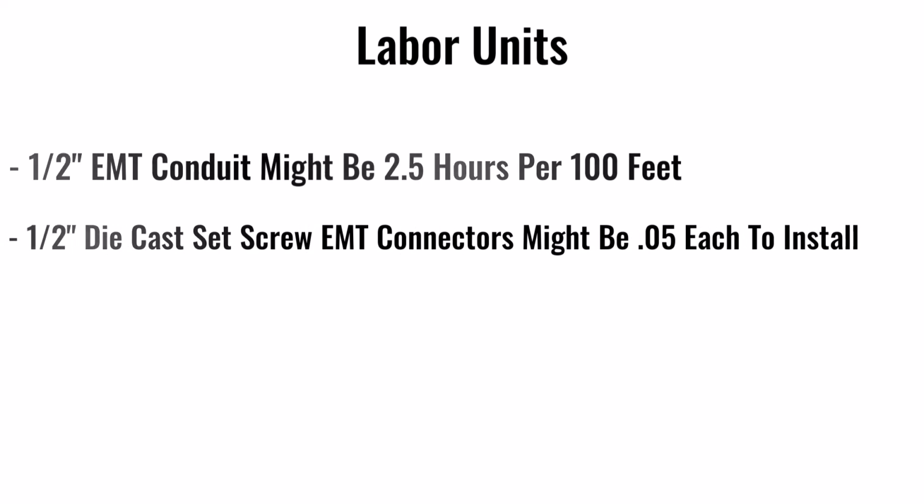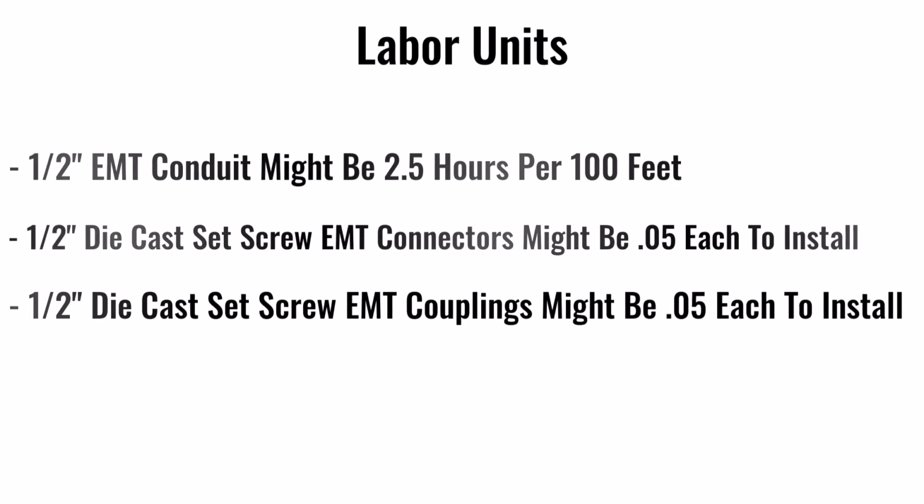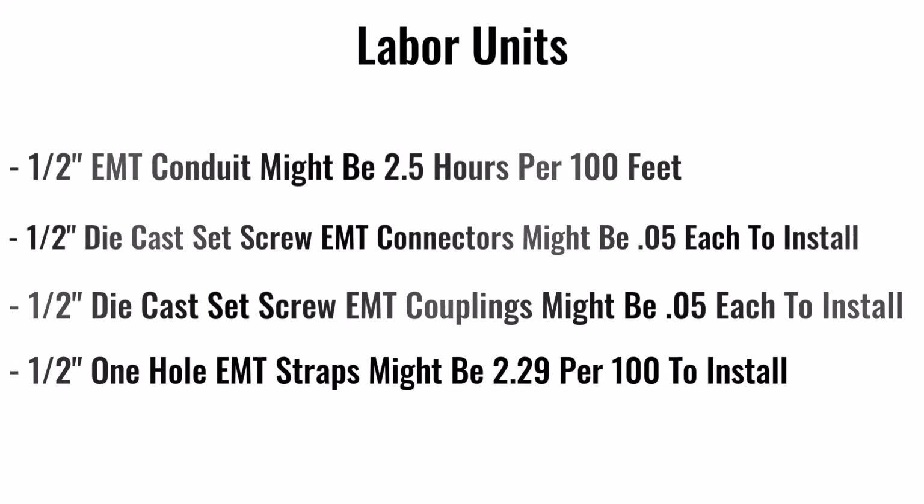Half-inch die-cast set-screw EMT connectors might be 0.05 hours each. Half-inch die-cast set-screw EMT couplings might be 0.05 hours each. 1/2-inch one-hole EMT straps might be 2.29 hours per 100. You may have noticed that I said "might be" for all the examples I listed.